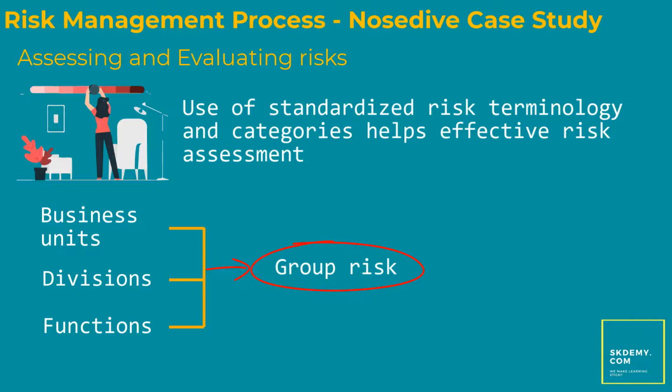The risk rating or score may change if common risks are grouped. So if you have 3 or 4 medium or low level risks, but they are very similar and you combine them, then obviously that combined risk would logically be a higher rating risk. If considered collectively across the business units or divisions, a risk of low severity individually can become more critical.